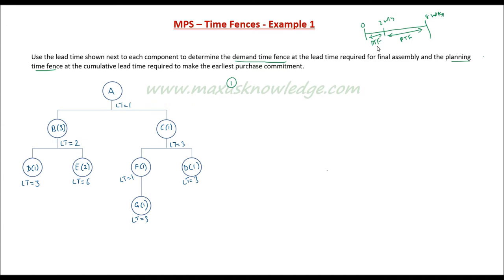Demand time fence is where you want to do very minimal changes. The question says that the demand time fence should be set at the lead time required for the final assembly. Final assembly is A and in order to assemble A using B and C, you need a lead time of 1 week.